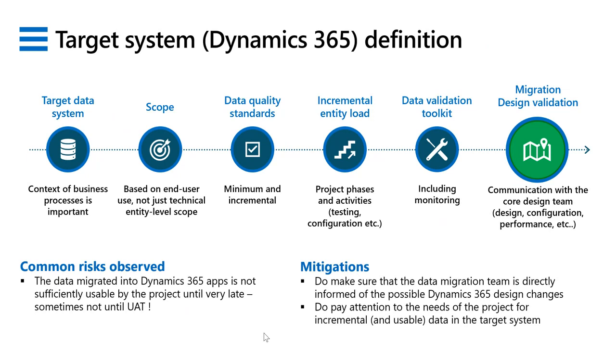Right? What is its end use when it arrives in the target system? What are the minimum standards that it needs to meet before it's accepted into the Dynamics system? Again, you should have another gate at the other end. So we are not even going to load this record if it does not meet the following criteria.